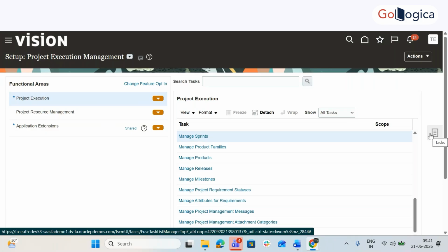Every day cannot be allocated to the projects module. So we'll have to wait until the CRP1 is completed. Then the CRP2 is there, and then the CRP3 is there. At least 2 iterations are definitely there. And then the UAT phase, QAT phase, you train the users, and all that phase is going on. So this is basically defined in the methodology.